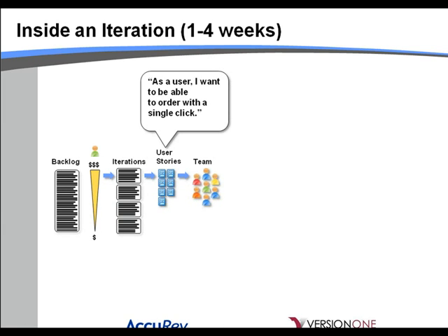So those are the user stories in that iteration, which the team works on, the whole team, remember. And from that, they're going to produce the changes that fulfill those requests and the tests that go along with it: unit tests, stress testing, automated tests, whatever it is, test plan. That's a month's worth of work, or perhaps a week. It can vary from 1 to 4 weeks. Sometimes people have iterations that are a little longer, but 1 to 4 weeks is generally best. That's the work done.